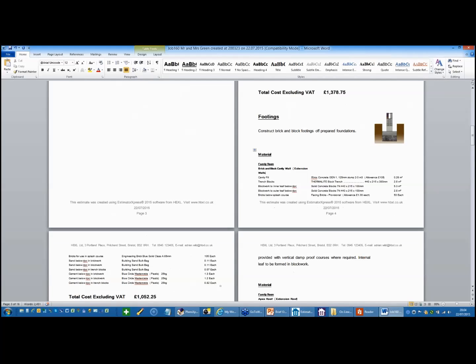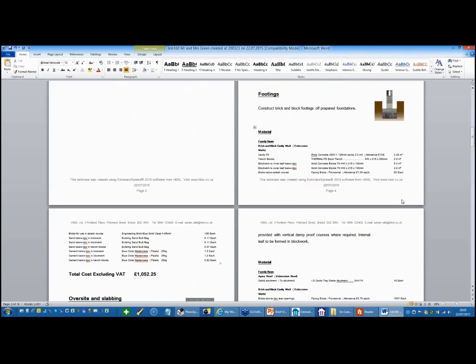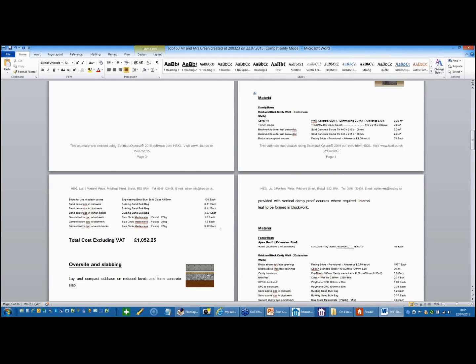Further down, you can now see that it's describing each of the elements, and because I've said yes, I want to put quantities in, it's pulling in the estimated quantities without the wastage factor in here. So if the client starts counting bricks on the job, he's not going to say, "Hoi, I thought I was going to get 1,500 bricks," because some of them are obviously being wasted, which, we all know, is part of the building game. Waste is a fact of life.